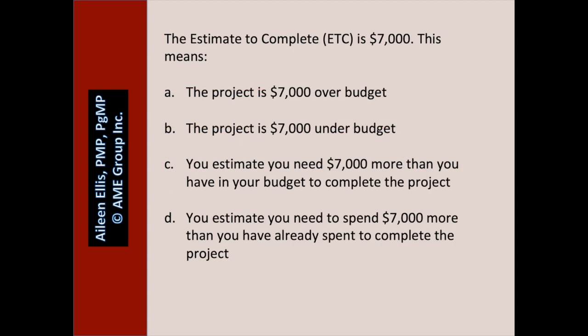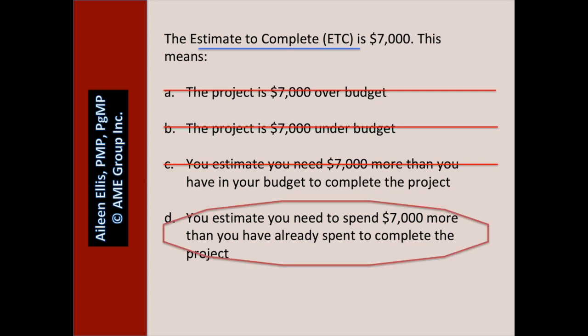The estimate to complete is $7,000. This means — ask yourself: what does ETC mean? It means we need to spend $7,000 more to finish the project. A: the project is $7,000 over budget — we don't know. B: the project is $7,000 under budget — we don't know. C: you estimate you need $7,000 more than you have in your budget — we don't know. All we know is that you estimate you need to spend $7,000 more than you have already spent to complete the project. That is what ETC means.